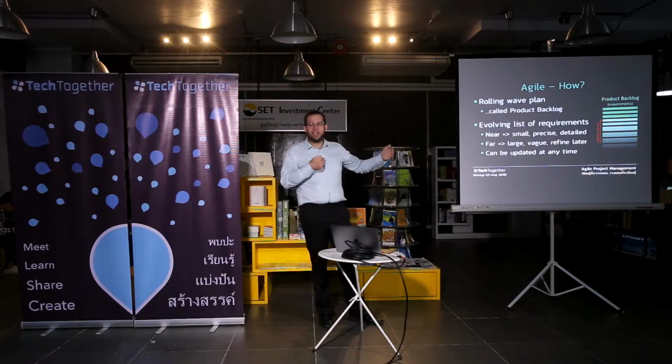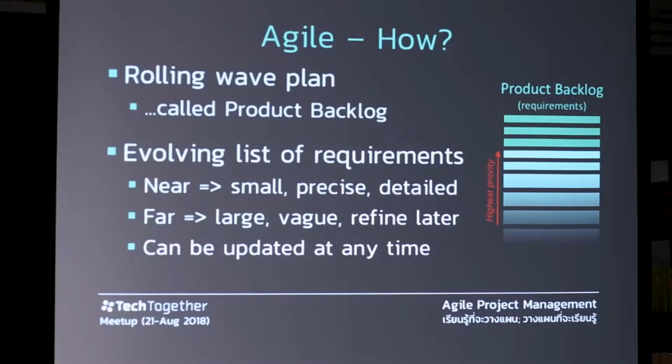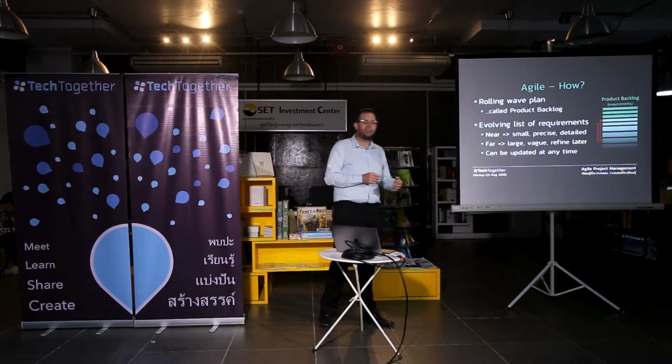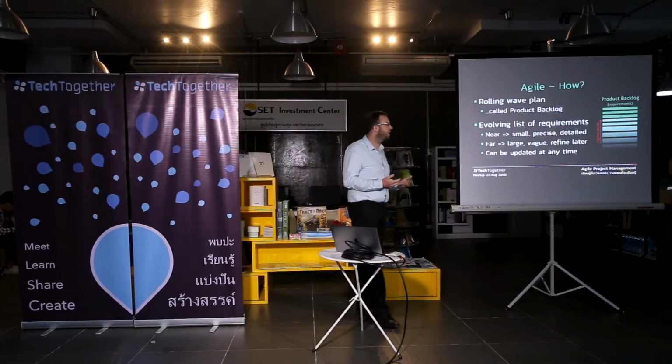So if you're working on say a 2-week sprint, you've locked into 2 weeks worth of work. This work you will not change. Anything after those 2 weeks, you're free to change. So I mentioned embracing change earlier.